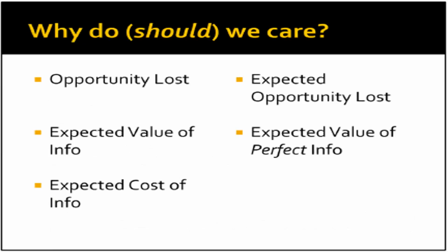First up is opportunity loss versus expected opportunity loss. Opportunity loss is looking at a single option. It is the cost of choosing the wrong path. Expected opportunity loss is for when you are looking at multiple options. It is the cost of choosing the wrong path multiplied by the chance of this being the wrong choice. You would use EOL if you are uncertain about the possibility of negative consequences for your choice. The existence of EOL is why so many business decisions take a long time to make.